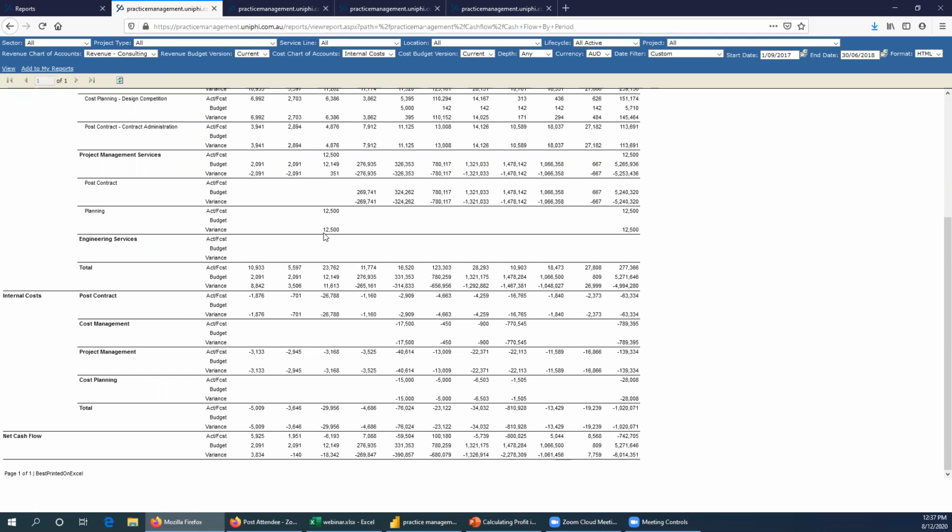They need to either have project by project splits in their payroll system to come into their charts of accounts, or what some do is actually create dummy cost contracts for their staff and allocate costs to each project through those contracts, which is quite interesting. And that way the costs get allocated into the projects for the resource time.